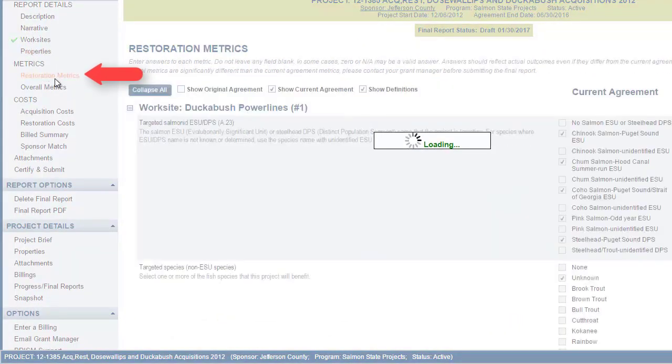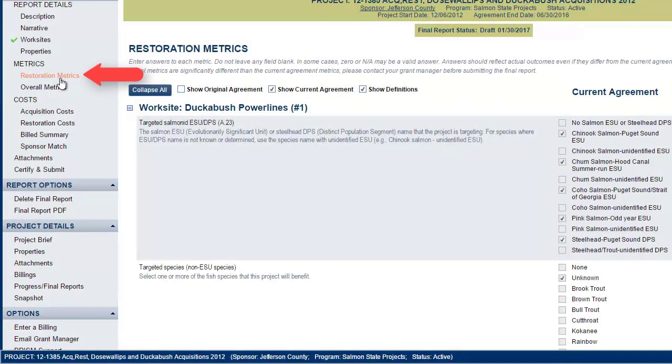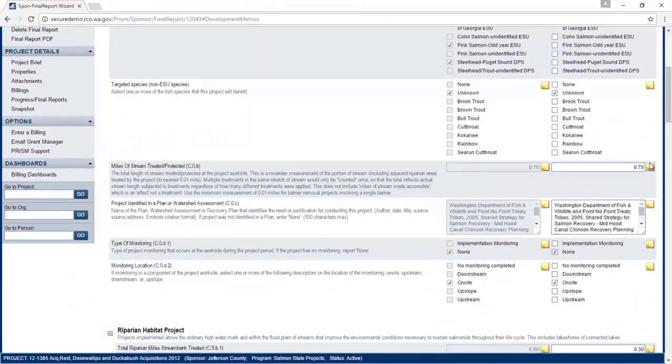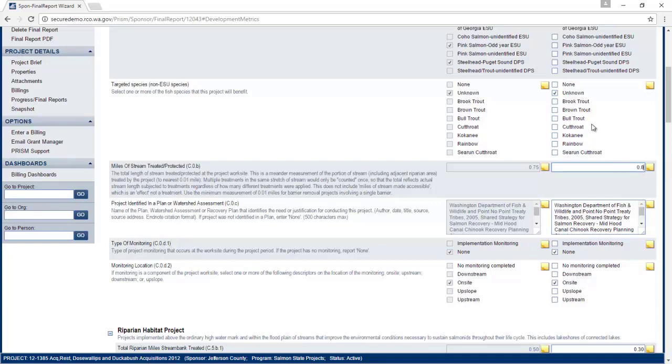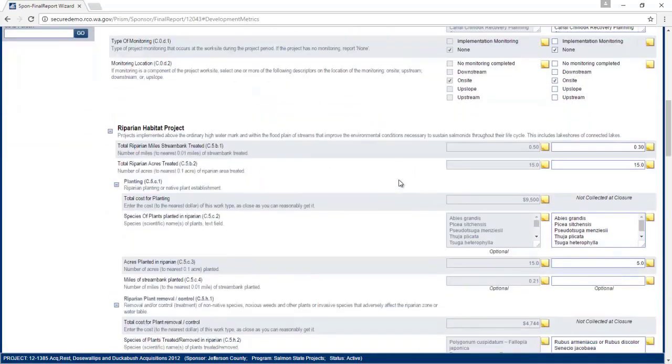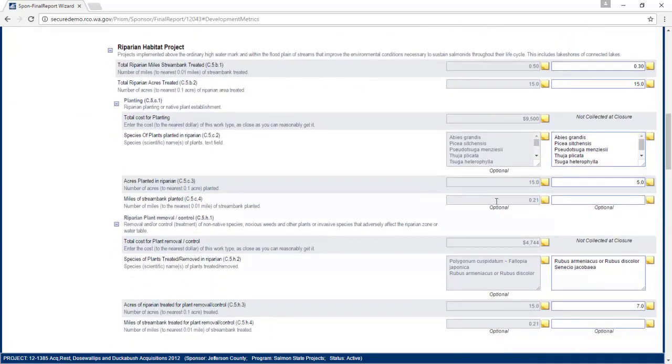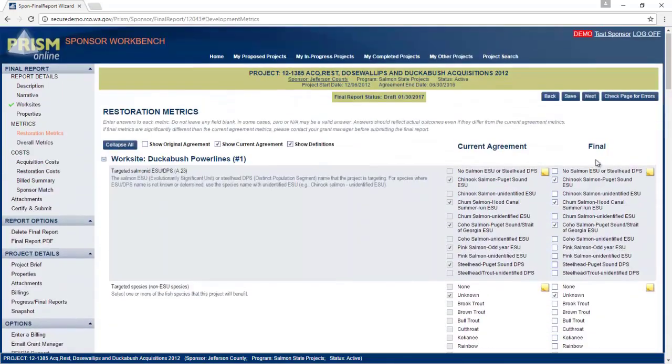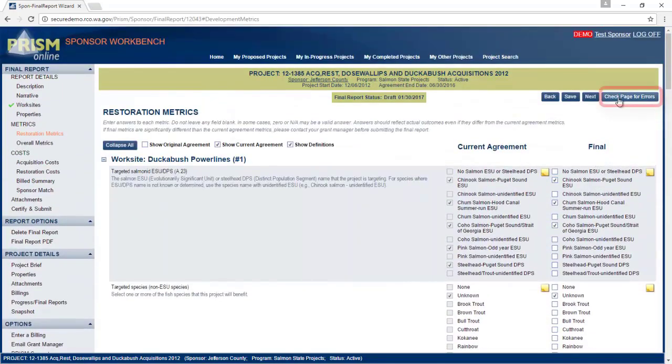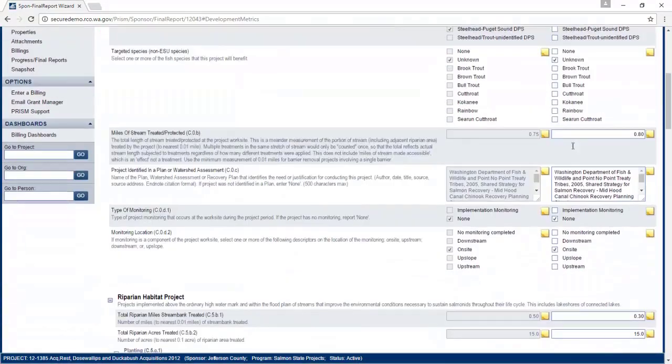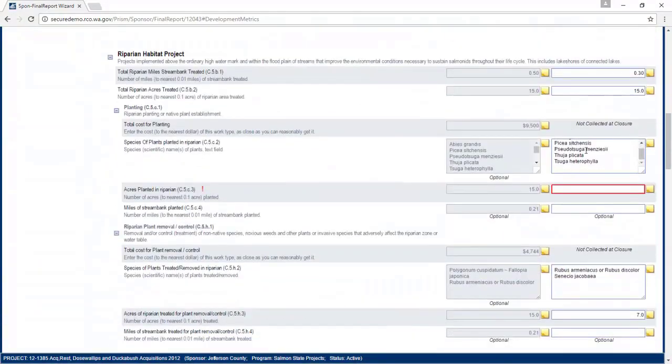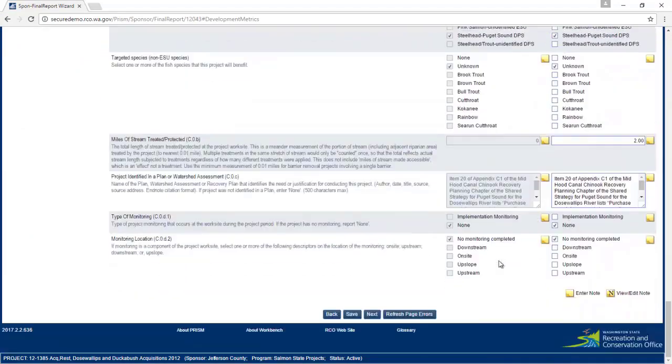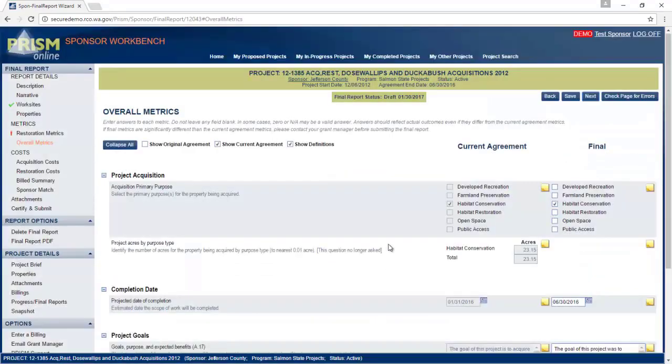For the metrics pages, you need to enter the final metric for your project. If your project had progress metrics, you may see some metrics values already in there. Just go ahead and update them. If you are missing a metric, use the check page of errors button so it is highlighted and you can find it easily. We will leave it blank so we can come back and fix it.